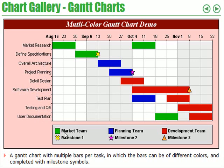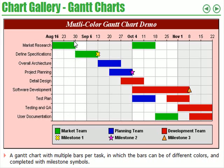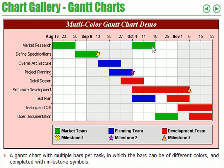The various colours show the teams of people involved at various stages in this project. With market research, you have a market team involved from the 16th of August until the 30th of August. Then they have defined specifications taken from the 30th of August going along to the 13th of September. Going back to market research, they looked again from October the 4th to October the 18th.